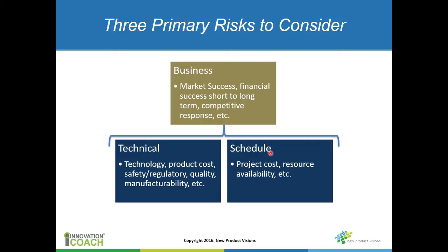Then there's the schedule risk, whether you will get the project done in the time frame that's required. And kind of a part of that, I lump it in with the schedule risk, is the project cost risk, the risk that you will go over cost on the project. And that's really driven typically by the schedule. The longer a project takes, the more people have to spend time on it, and that's typically the biggest cost driver in a project. And things like resource availability, the risk that you won't have the resources required at the time that you start the project. That's a real common problem in most companies.